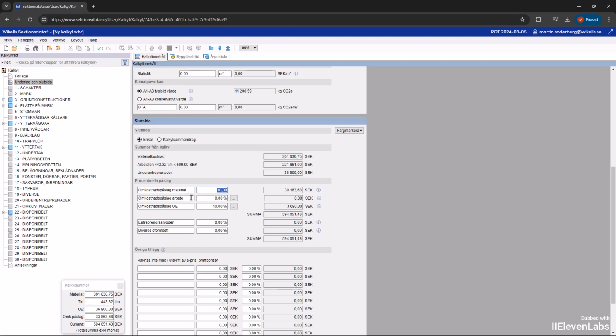Instead of cost estimate work, I could write fastening material to include it. Set a percentage rate here so that it's based per hour. We keep the overhead markup for subcontractors at 10%. Below here we have the contractor table and various contingencies.